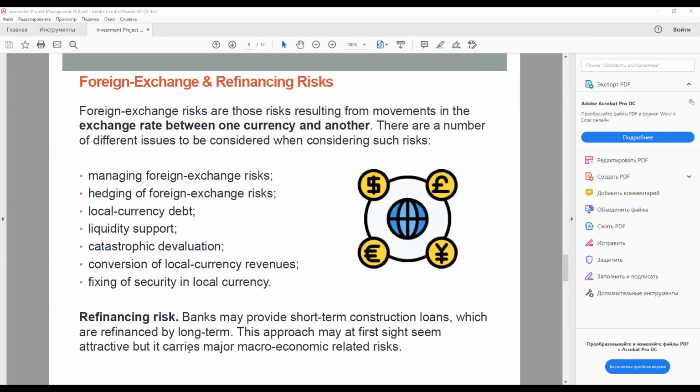A further macroeconomic risk is that there may be a lack of liquidity in the loan or bond market at the time of refinancing, making it actually impossible to obtain long-term finance when needed. Lenders might also have a concern that the project could be going badly at the end of the mini-perm period, and so cannot be refinanced even though the issues above do not arise. So logically, however, either the project will go well, in which case it can be refinanced, or it will go badly, in which case there will be a problem anyway.